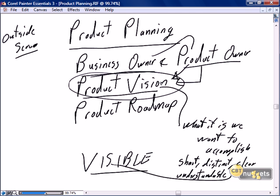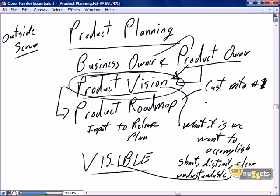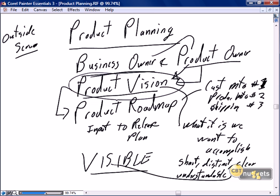While the product owner and business owner are developing the product vision, they typically lay out the product roadmap, which is the input to the release plan. The roadmap establishes priorities: customer maintenance is number one, product maintenance is priority number two, shipping details is priority number three, and so on. This is where they begin to set the overall priorities for future releases and sprints.